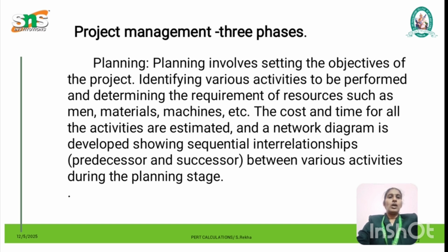First, to develop the project management, we have to plan, then schedule, then allot the time scheduling. First, you have to identify the objective of the project. There are various activities and the resources available, men, material, machines, etc. And also the cost and time for the activity are estimated. Based on that, we have to construct a network.